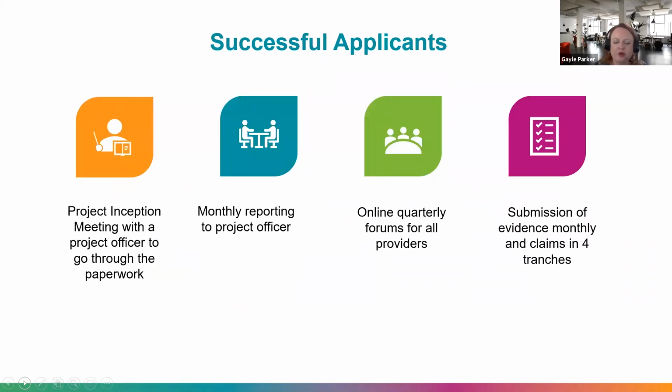So once you have been awarded the project, then we will book in a project inception meeting with you. So that will be with myself, Ali or Heidi, and we will go through with you in some detail the paperwork that needs to be produced. So we're going to talk about that in more detail now, but we will go through it again with you. Appreciating that there's a bit of a long time scale between now and when you start the project. We'll also be looking for you to produce a monthly report to us. So that's just for us to check on progress and also to flag any issues that may arise. And obviously then we'd start to talk to you and help you with trying to manage those issues.